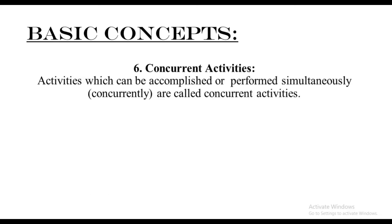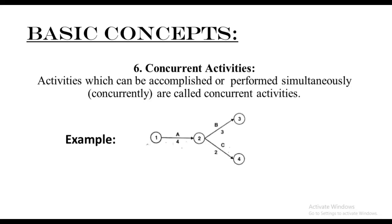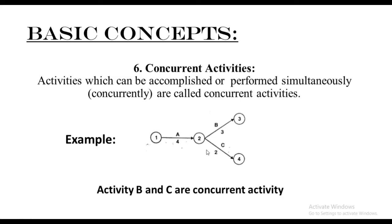The next concept is concurrent activity. Activities which can be accomplished or performed simultaneously are known as concurrent activities. For example, in this diagram we have activity A with starting point one and end point two. After the completion of activity A, there are two activities simultaneously being performed — activity B and activity C. This is a concurrent activity. Activity B and C are concurrent, meaning from one single activity two or more activities can be performed simultaneously.